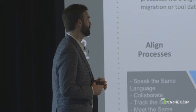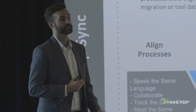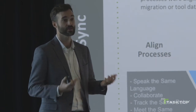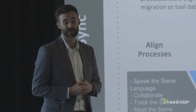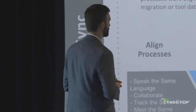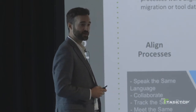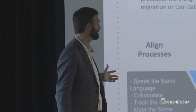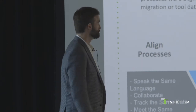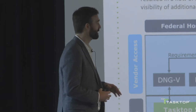to get that established. And then Serena, that's where our requirements come in. We made the determination that a sync wasn't necessarily needed there because the updates were only coming in a couple of times a year, so a daily sync didn't make sense for us. So this was our approach: starting by getting people speaking a common language, which, like I said, we didn't quite get there; then deciding which approach we were going to take; and then implementing. So this is our initial synchronization process.